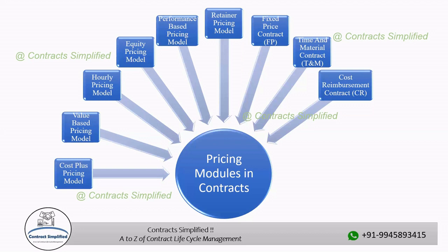Cost plus award fee contract. This type of contract involves a subjective evaluation of the contractor's performance by the contracting agency. The contractor's fee is based on the agency's assessment of their performance, which will typically be tied to specific criteria or objectives.